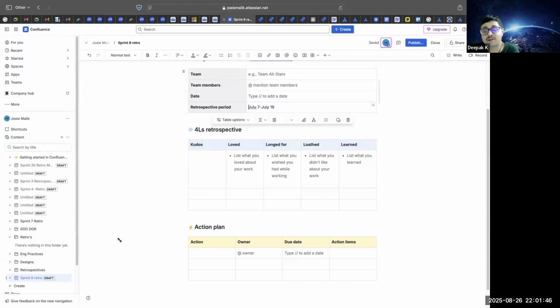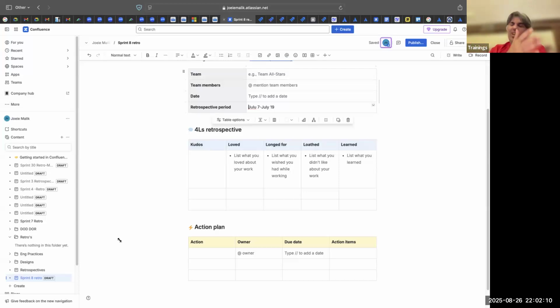What our Scrum Master in my previous organization used to do is schedule and bring everybody together and ask them to update Jira at that time. That was a very popular technique. So let us say they ask you in the interview, if the team is not updating Jira, what practices will you use? If the call starts at 10 a.m., from 10 to 10:15, and they are not updating Jira, then the call starts at 9:55. From 9:55 to 10 o'clock, the first 5 minutes, let's update Jira and then let's have the discussion. It's a very popular technique.